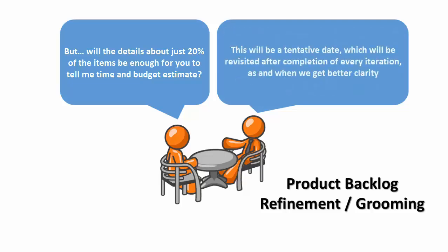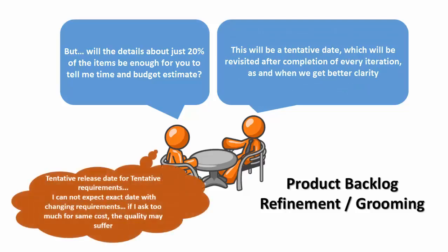This will be a tentative date which will be revisited after completion of every iteration as and when we get better clarity. Tentative release date for tentative requirements. I cannot expect an exact date with changing requirements. If I ask too much for the same cost, quality will suffer.